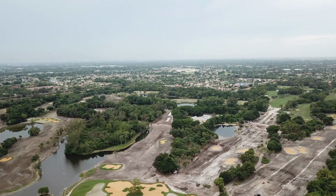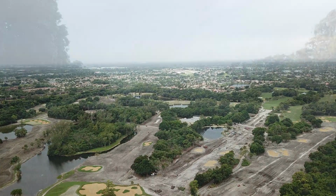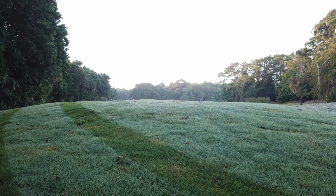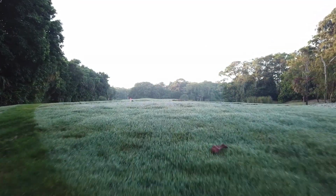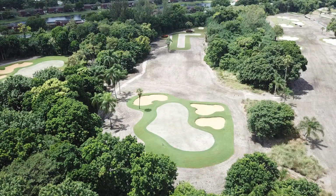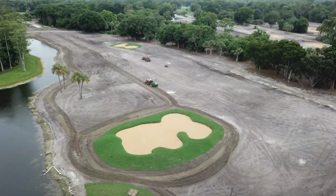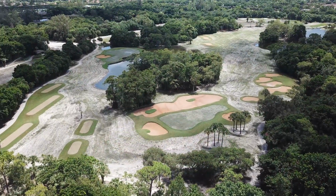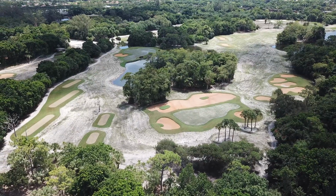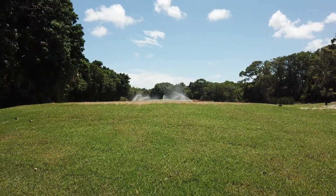the entire golf course. Latitude 36 sod planted during the past few weeks on green slopes, tee slopes, and bunker slopes has rooted well down into the soil and is thriving. Tee slopes at number 9, 10, and 7 and bunker slopes around fairway bunkers at number 9 and 10 will be sodded next Tuesday, completing most of the sod work on the golf course.